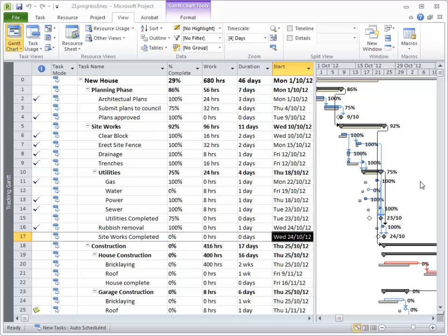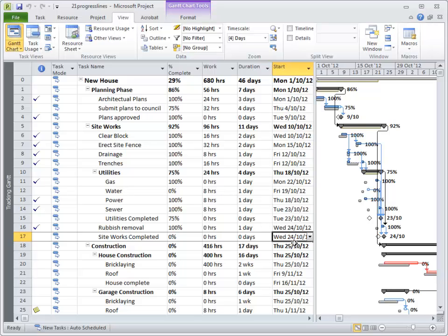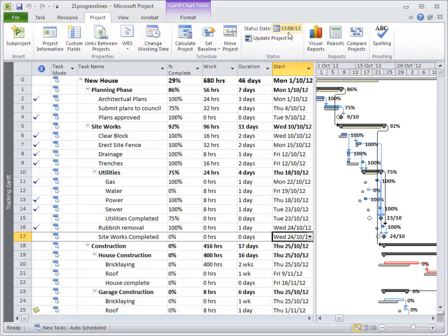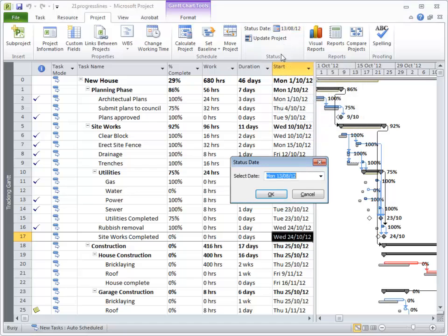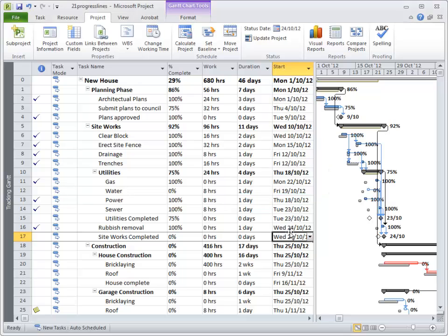A progress line is a visual item on the Gantt chart we use to have a look at how the project is progressing. To do that we need to know at what point we want the progress. So let's say it's the 24th of October — siteworks are completed. Under the Project tab, Status Date at the top, I'm going to set that to the 24th of October, the status date.